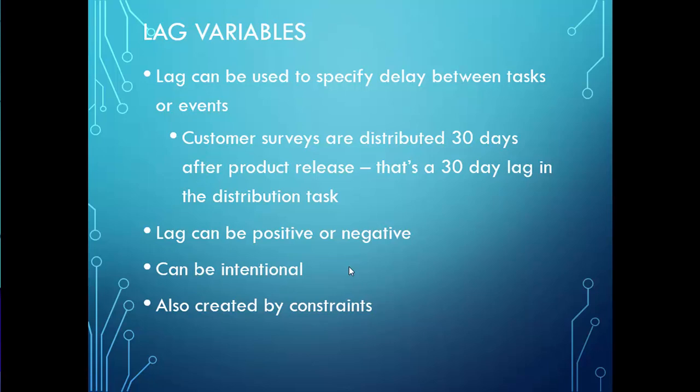The lag is the time allowable for us to delay certain activity execution. So, for example, if I have a lag time of 2 days for an activity that is 4 days duration, then I have 6 days in total. So, although I have 6 days, the task can be finished in 4 days.